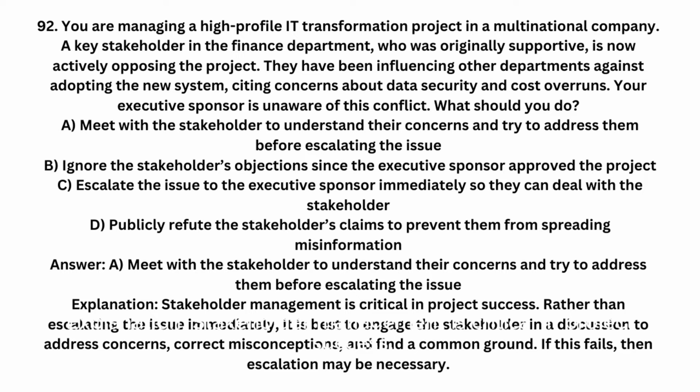Explanation: stakeholder management is critical in project success. Rather than escalating the issue immediately, it is best to engage the stakeholder in a discussion to address concerns, correct misconceptions, and find a common ground. If this fails, then escalation may be necessary.